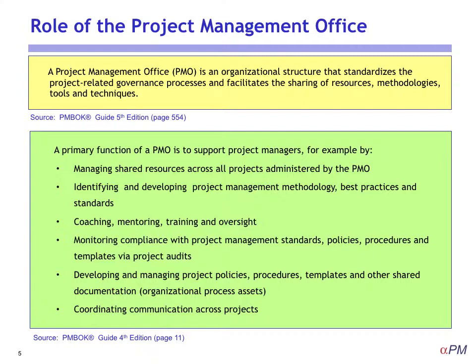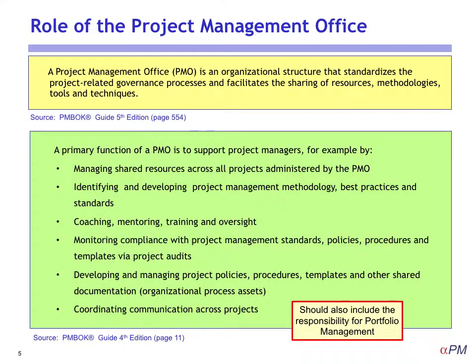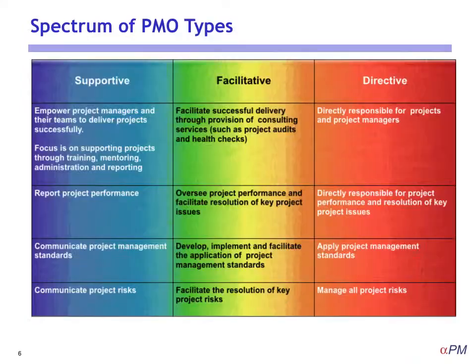One thing I think they've missed and not emphasized at all is the role of being responsible for portfolio management. I think that's a very important role for a PMO, particularly if your organization has the type of projects where you're doing a lot of internal work. It's not driven by contracts and outside work, but it's driven by internal projects, and there's always conflict within an organization of which one should take priority, which one should get the resources, and this is where I think a PMO can play a particularly valuable role.